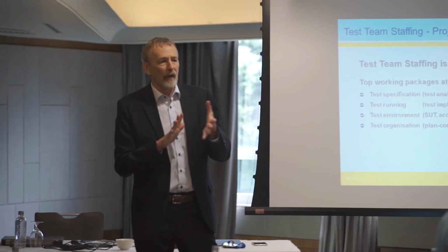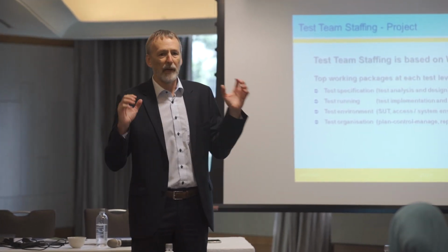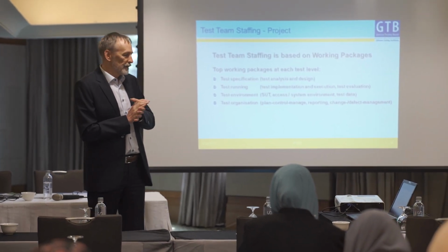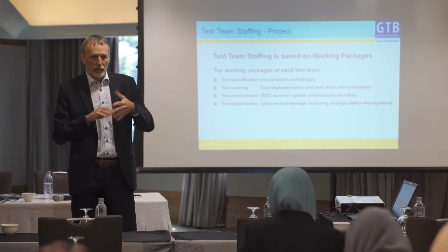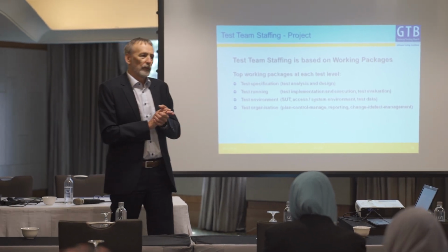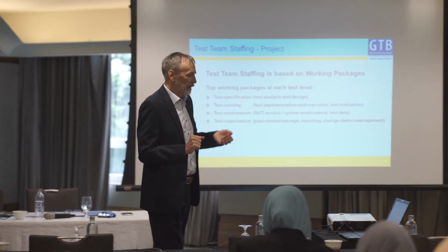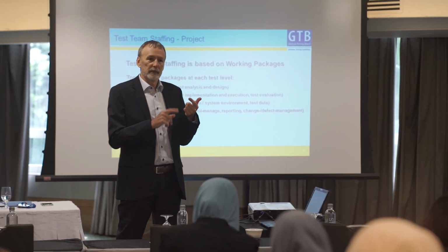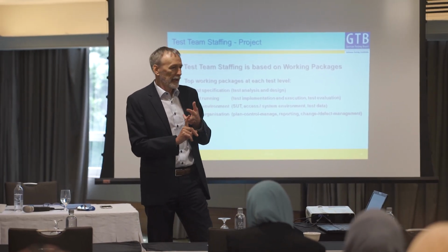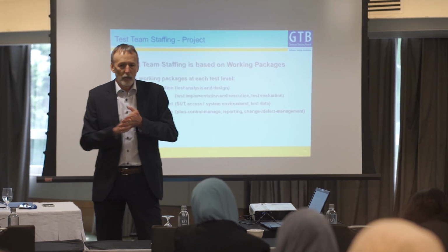For me, at each level, I have 4 main tasks, 4 main work packages. First is the test specification: what kind of test cases, or the amount of test cases that I want to execute. That includes requirement analysis, risk analysis, and test case design. Then I have the test running work package.